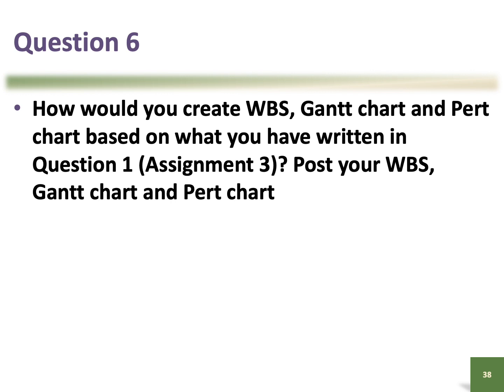So the important part is you would do your WBS first, because that allows you to know what your project is about, what your goals are, and then what tasks need to be done, without having to worry about how many days it would take for each of the tasks, right? So you would start off with WBS, and then you can do a Gantt chart or PERT chart. It depends on which one you prefer.